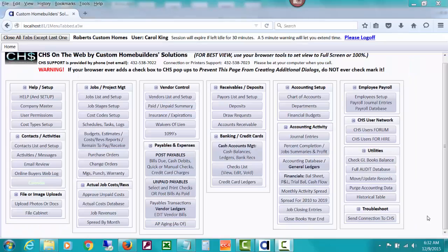So one additional thing I'd like to say about creating a variance PO and then doing a back charge behind it is the effect that it might have on the estimated cost at completion, and something that you can do, like issue a variance PO for that back charge itself. CHS can't automatically do that because of the way it's designed to drop in the back charge connected with the record and then create it.